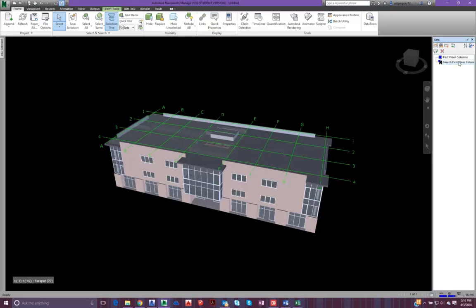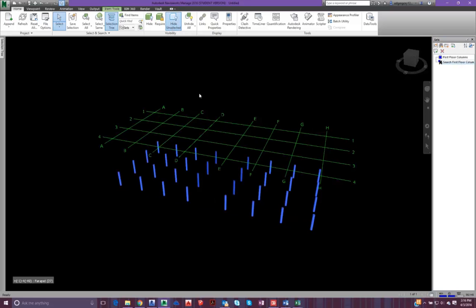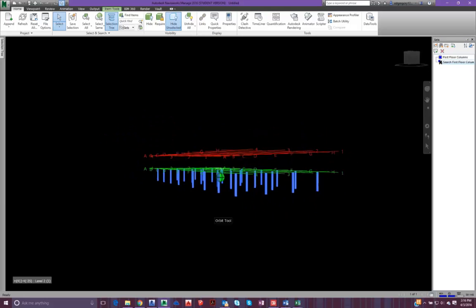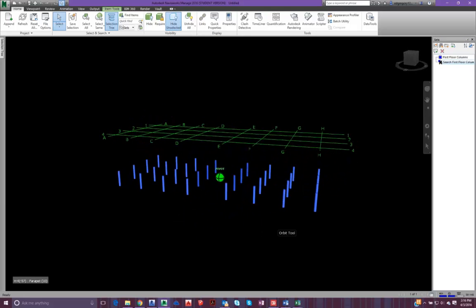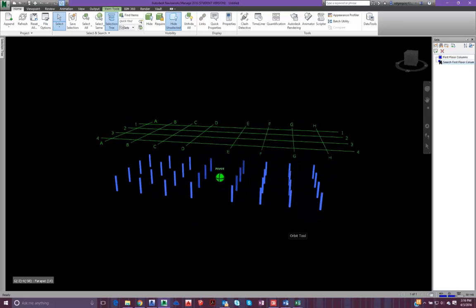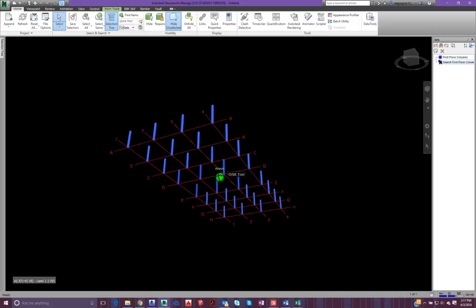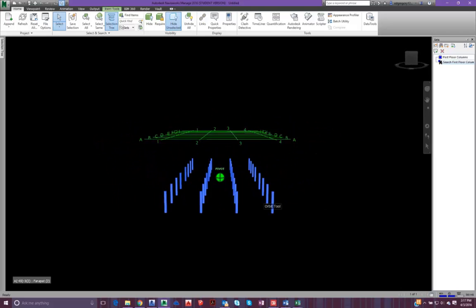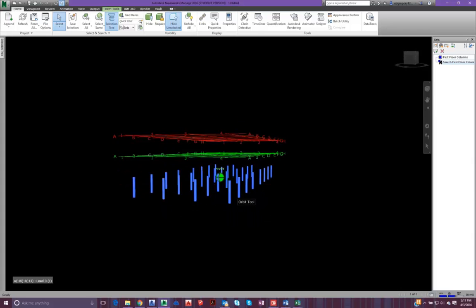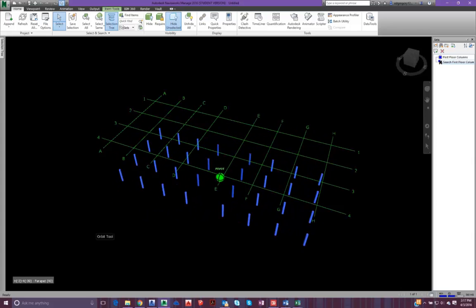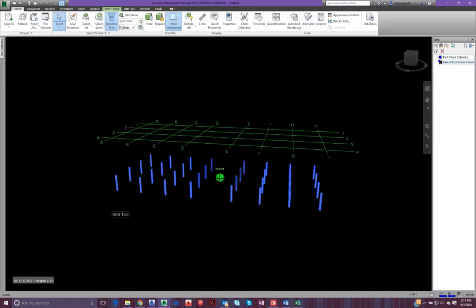So when you're going through, this is a very macro level of doing things. For what I mean by that, when you go ahead and do your actual construction, of course you wouldn't build all of these columns at the same time. Now when you run the Timeliner, it'll show all these columns coming in at the same time because they'll all be associated with one event in the schedule.